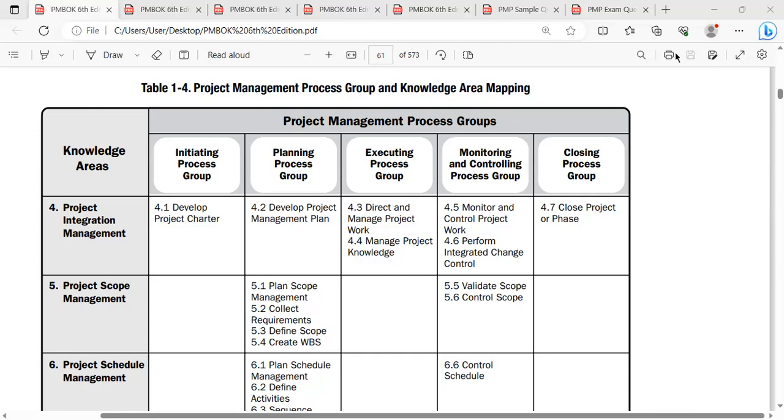The reason for you to bring the stakeholder register is that without it, it is very difficult for you to collect the specifications from the customers. Because you know very well, all the information in the project charter will be summary level information. Once the project keeps on evolving, you need to add more detail. If you don't have more detail, you're not able to develop your management plans, especially when you're working on predictive projects. Once you're working on a predictive project, you need to know your project in detail, and early planning is very important in predictive projects.